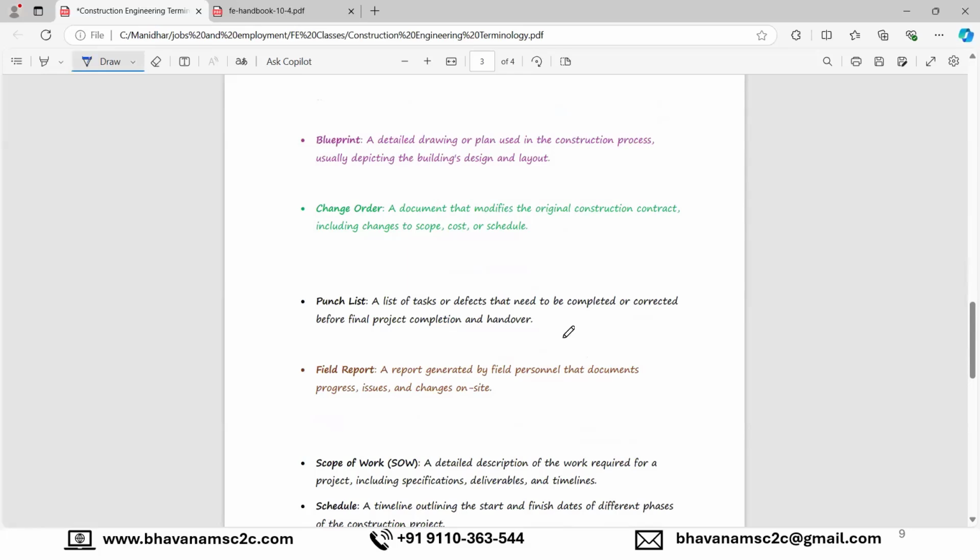So what does the engineer do? After completion of the project, the engineer provides a list of problems to a contractor to act on. And the contractor has to act on them without any extra cost, which is called a punch list.